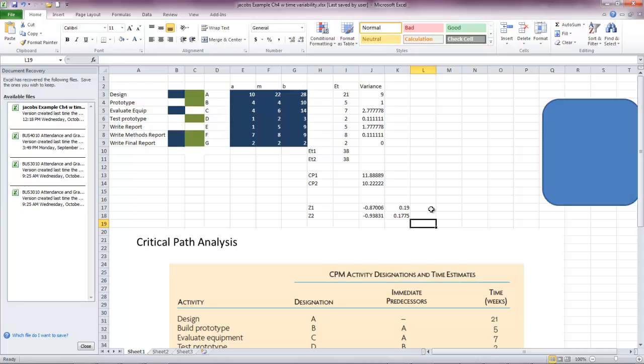Probably what we should say is use our worst case. That would be a strategy here. The worst case would be that there's more variability in the second path, because there are two different activities in the second path than there were in the first, and there's one additional one. Okay, so there's actually 5 rather than 4 activities, and so that's going to add more variation when you go through that. Each of these has some kind of bad variation in it, right? That causes us to be unsure of what we can promise a customer.